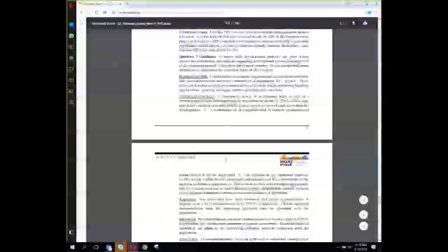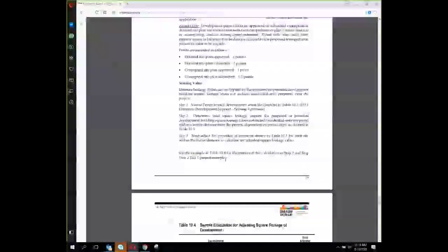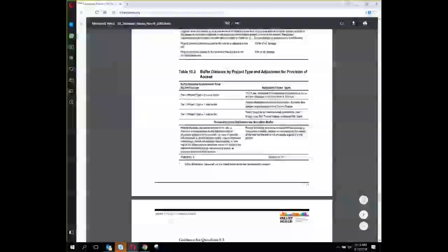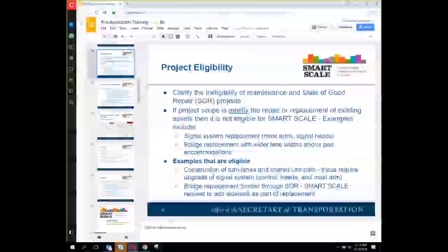Thank you, Chad. Another question was, what happens to a pre-application that is not pre-screened? If the applicant does not request pre-screening, they would essentially go directly into the full application. And one of the things that I didn't mention that I should have, and I apologize, everything you enter on the pre-application gets ported over to the full application.